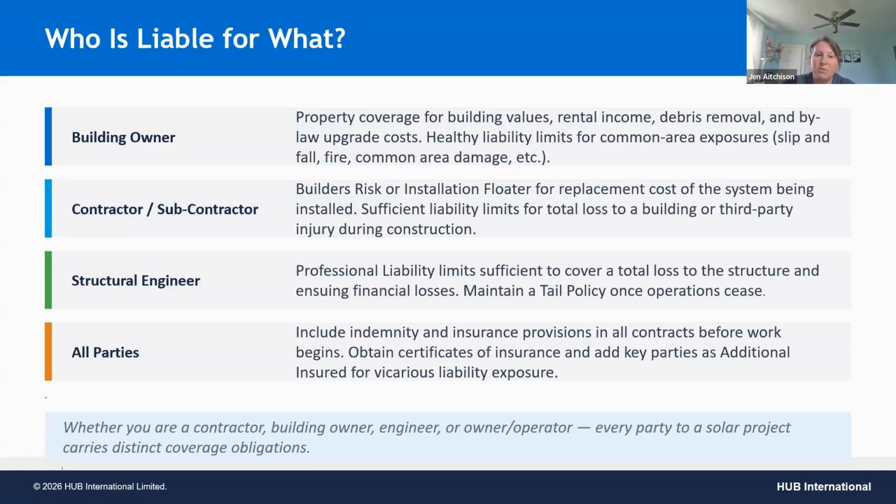And then all parties, of course, would include indemnity and insurance provisions in the contracts before the work begins. So making sure that everybody has the appropriate insurances as set out by all the contracts, and that any of the contracts that you're undertaking that may have flow-through requirements for subcontractors or counterparties, making sure that all of those clauses are pushed down through your own subcontracts. And making sure that you have contracts with your subcontractors is also key. Just having insurance isn't enough. Just having proof of insurance isn't enough. Making sure that there's a contractual relationship and not just a handshake.